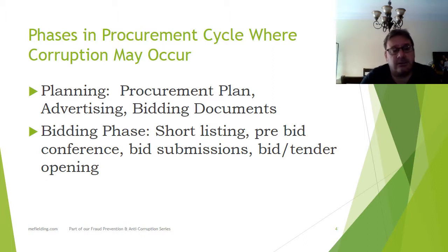So with our bidding documents, and it's very close to advertising, full information, all of the information as well about how people bid, what you expect to see. A standard bidding process, you want to see a technical proposal, then if you pass the technical, we'll look at the financial, so you need 2 different envelopes. Where do we send them, what's the format, what's the closing date, if you have a bid protest, who do you protest to, what is the process, and what's the publication of queries.